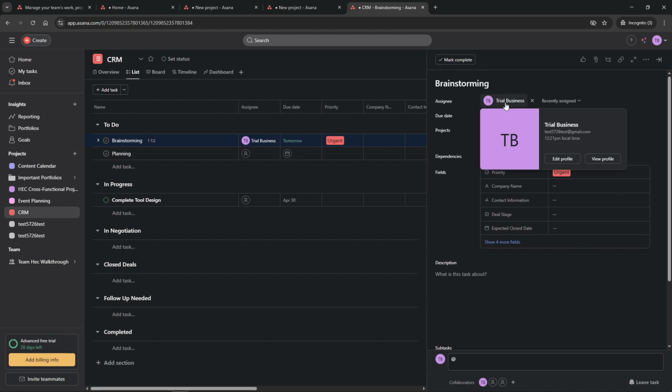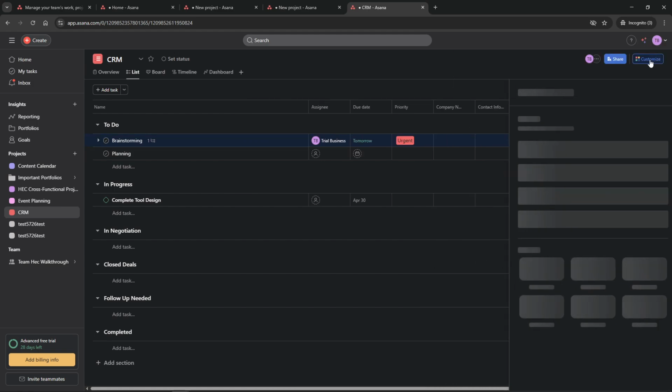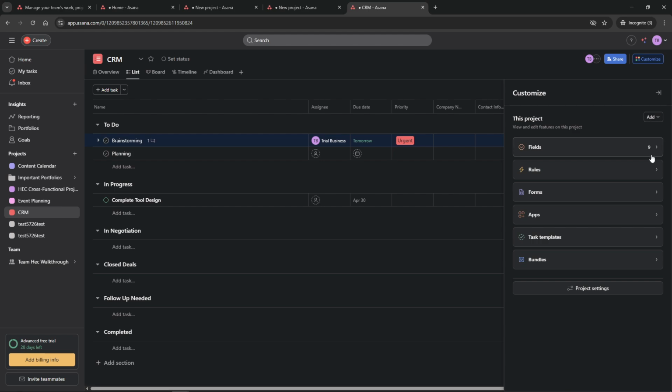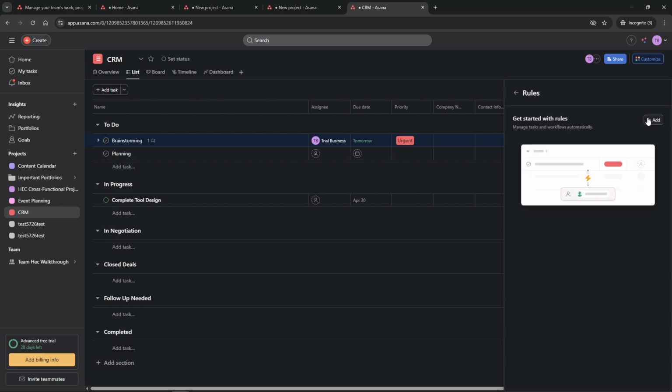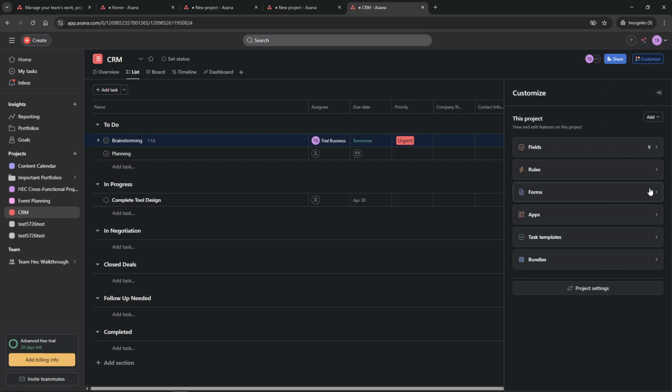Take advantage of Asana's features that enhance workflow efficiency. Set up dependencies to indicate that certain tasks need to be completed before others can begin. Use custom fields to track task progress, priority levels, or budget allocations, tailored to your project's needs. Automations can save time on repetitive tasks, such as moving tasks to the next stage upon completion. Finally, make use of Asana forms for content requests or approvals, simplifying information gathering and decision-making processes.